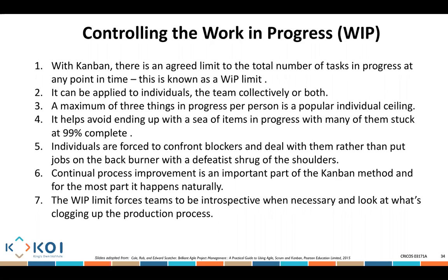It helps us avoid ending up with all of this work that is 99% complete, but cannot be released to the client because it is not complete. If there's a problem and if there's a difficult task that is stopping a team from progressing towards a goal, what will happen is we will force everybody to stop working and to go and solve the problems that are resulting in a task being done 99%, not 100%.